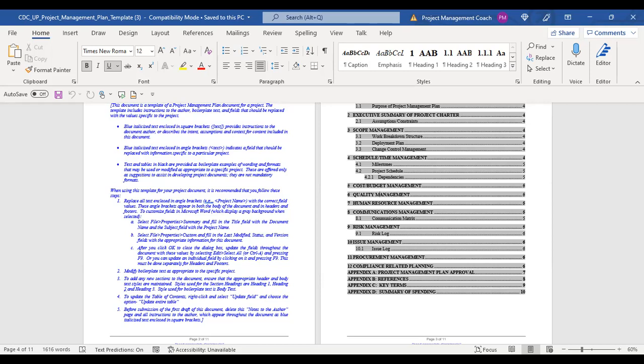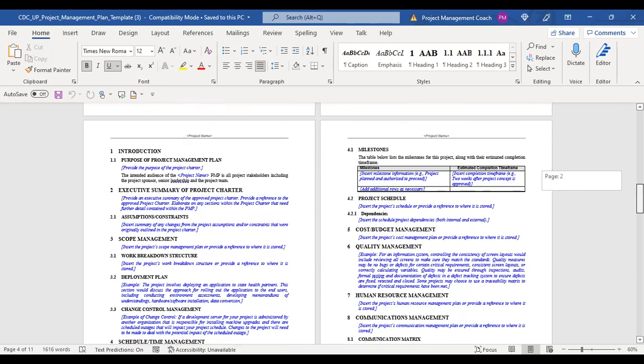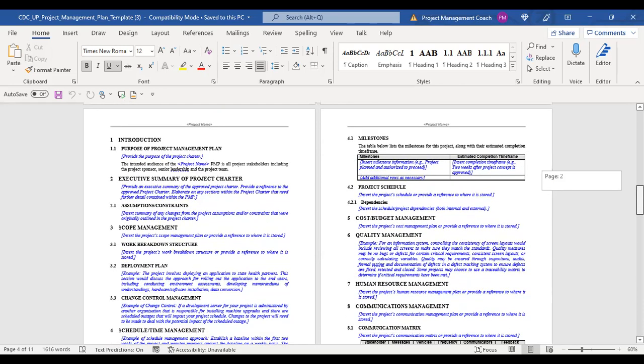The project management plan will be baselined. In other words, it will be approved by stakeholders, sponsor, customer, and so on. And it's important to define the bare minimum of schedule, cost, and scope so that when you're executing, you can measure what you are accomplishing to what was planned.